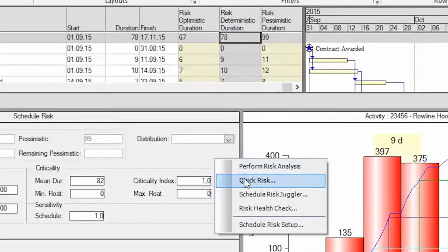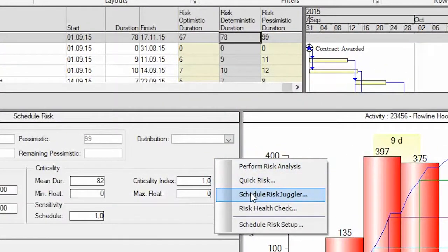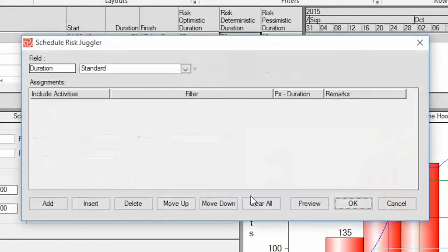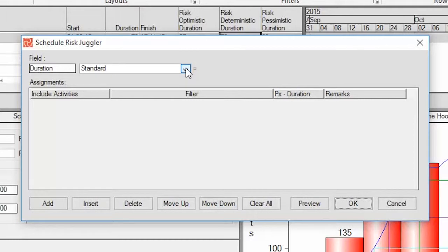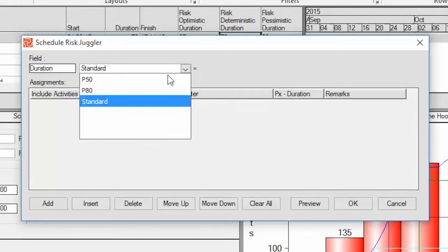For that I'm going to use the schedule risk juggler. I have predefined two alternative schedules, one for P50 and one for P80.